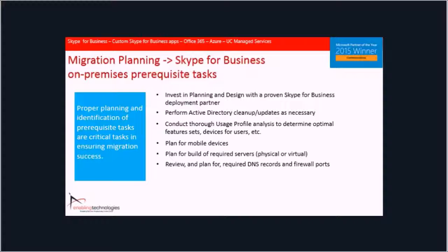As a project manager for many years, I had many projects that would occasionally stall for 3, 5, 10 days, depending on who that person was, whether it was someone in the security team, or whether maybe we just didn't have the right understanding of change management. But before you actually start the migration, make sure that you've identified who these folks are and that they're on board with what these firewall port and DNS record requirements are going to be. You see on the next one, I have it in all bold.